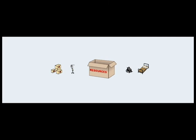Once these resources arrive on the scene, they must be formally checked in, tracked, and accounted for through a standardized resource tracking process. During the recovery phase of the incident, resources are rehabilitated, replenished, disposed of, and/or retrograded. Demobilization occurs in an orderly fashion with the return of all resources to their original location and status. Demobilization planning should begin as soon as possible to facilitate accountability of the resources. Finally, appropriate reimbursements must be made and inventory systems are updated to assess the availability of assets provided by jurisdictions.